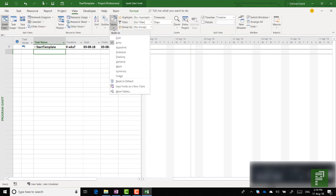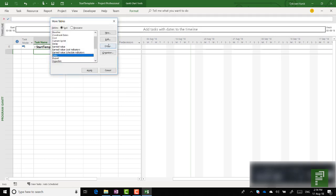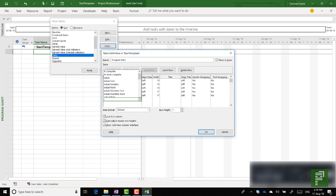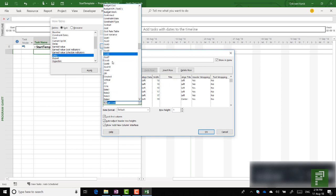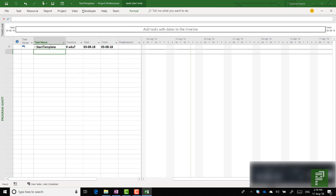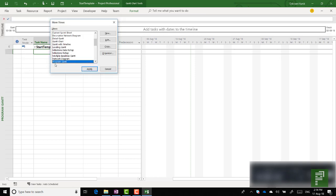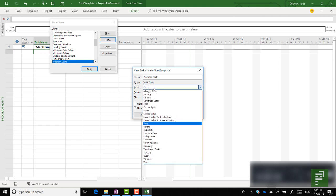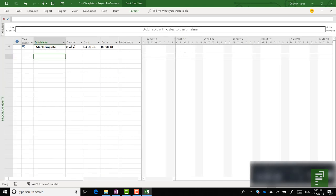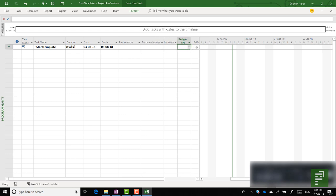Let's head back over to Views, Tables. Normally it's entry. What we're going to do is create a copy of entry and call this the Program Entry — I'll also show this in the menu. After resources I want to have Locations, and I would like to have my Budget KPI. So these two columns will be available. Let's head back over to the view, click More Views, Edit, and instead of having it as the table entry I'm going to have it as the Program Entry. Click OK and Apply. Right after resource names, now Locations and Budget is here.